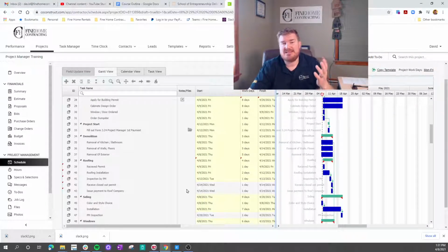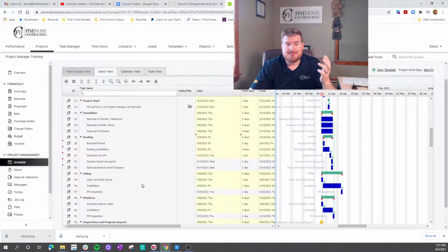Say you're doing the roofing. Once that part is already built in, when you meet with the subcontractor, you might have to adjust their time. Say, hey, I can't get there till May 1st. Then you're just going to adjust the whole roofing out. But if it's already in there, you already have an idea of where it's going to be. It's all set, and then all you're doing is grabbing it and adjusting it, saying, hey, my roofing installation is going to be out here.